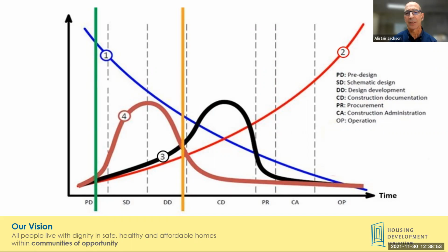early in the process so that we can begin to understand the specific standards, the targets that are being established for the specific project. And that's going to begin with the development team, the architect, but it's going to expand to the mechanical engineer, to key consultants, energy consultants, sustainability consultants, building envelope consultant may be involved at that point. And obviously the general contractor and even the mechanical subcontractor actually coming in this early stage is potentially going to